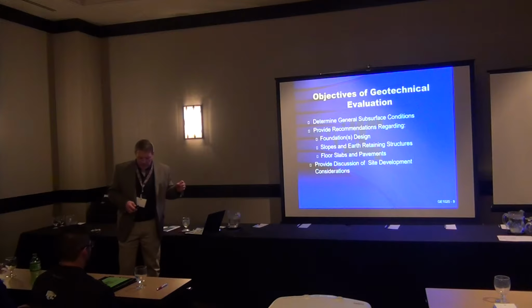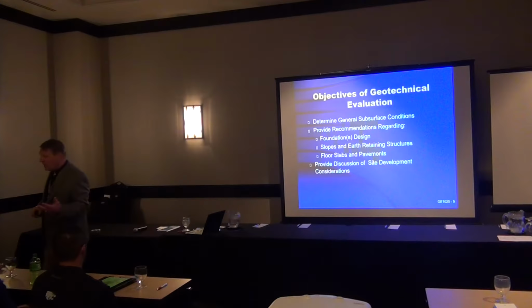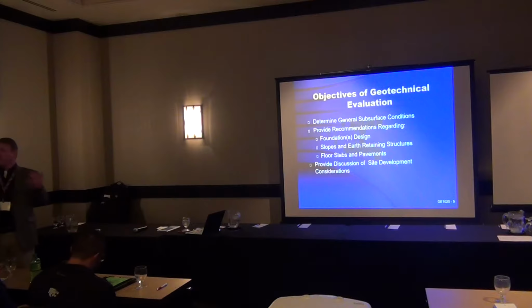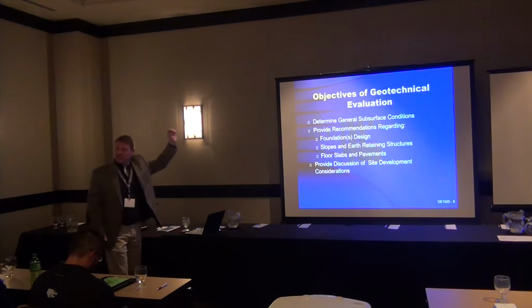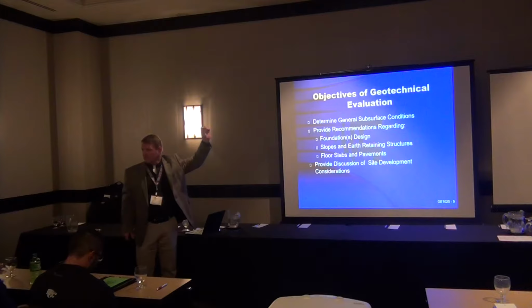And one of the things that, if you leave here with no other piece of information, is this. If you are given a geotechnical report, or you see a geotechnical report for a project that you're working on, open it up. In the first page or two, there will be a project description in there. If that doesn't accurately describe what you're building, your hand needs to go up. Because geotechnical engineering recommendations are very specific. They're very specific to what it is that's being placed on the site and the circumstances under which they're being put there.